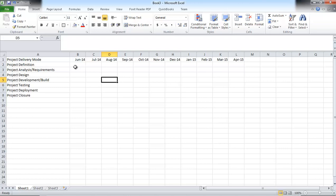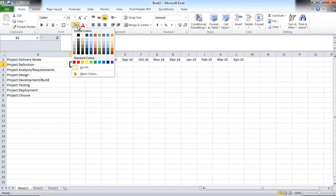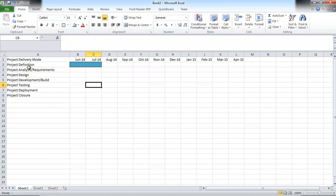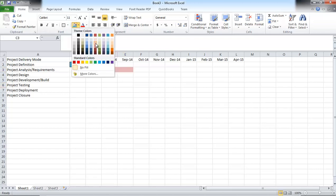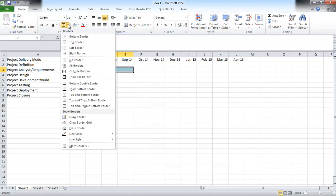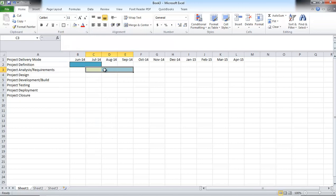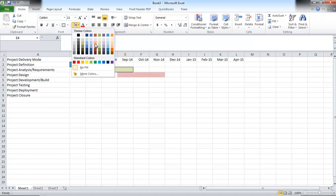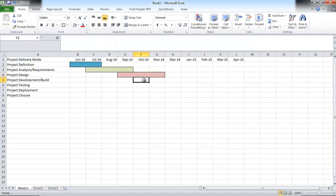And now we're just gonna say, okay, this first phase, project definition, is gonna last two months. So we're just gonna highlight it and pick the color for this phase. And we probably would want to round it and say, okay, yeah, this is two months activity. And then this is the definition phase. Analysis and requirements might take three months, so we do it a different color. And we also do a circle and borders. Here are chosen as outside borders only, so there's nothing inside, just as a better visual effect. Design phase might take a little longer and it might overlap. Some phases may overlap, some phases may not overlap. Let's assume the design phase will overlap, and we're gonna use borders as well.